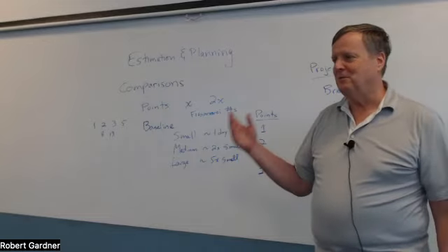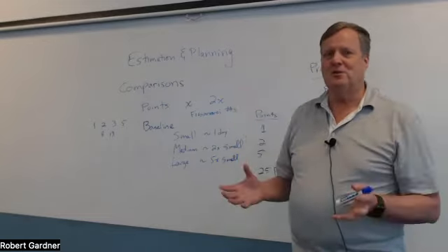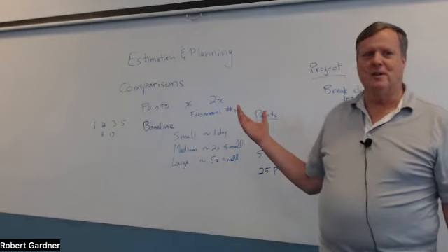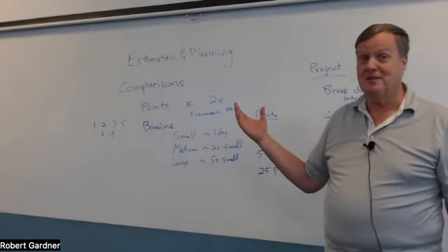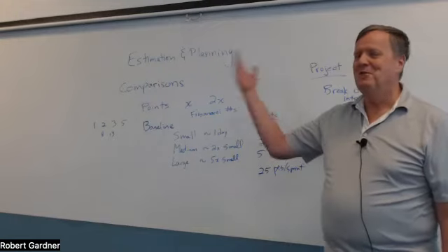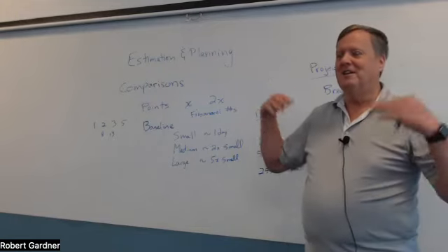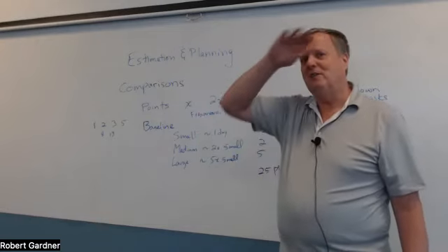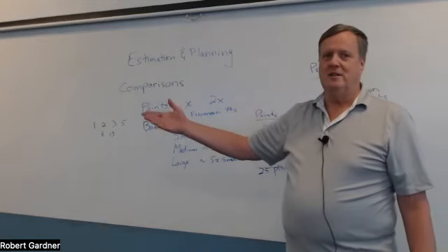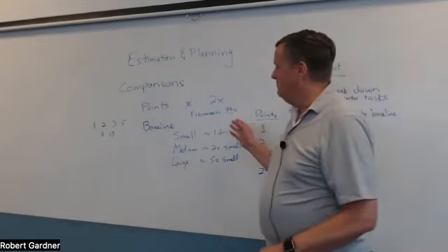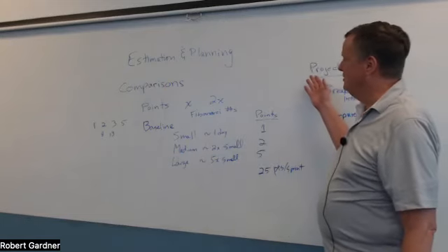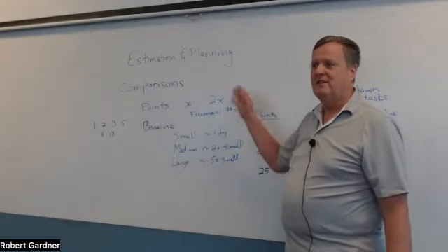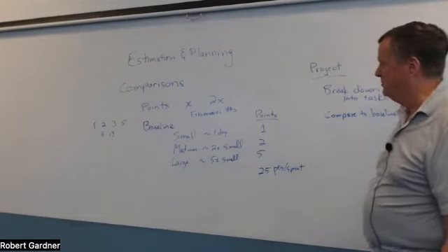I was kind of new on the team, but I finally got to where I understood what we were doing. I talked to one of the engineers and said, this doesn't feel like a 3-year project. It feels like a 3-month project. And he agreed. We went to the managers and product managers, and they were surprisingly reluctant to lower the estimates, but we finally convinced them to do it. And they ended up shipping in 6 months. The purpose of that story was to show you how hard it is to do these estimates on long projects, and how this agile process really breaks down on those big projects.